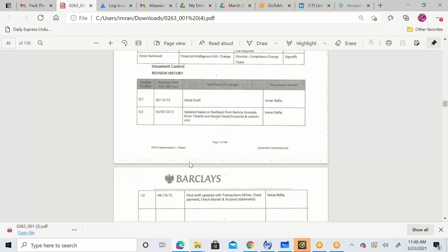And if there's something which is missing, something which we did not agree upon, something we have conflict on, we'll let you know. And you're not sending them for approval on the last day. You need to make sure that once your document is going to be ready, the final due date is going to come before that, at least 2 weeks before that.